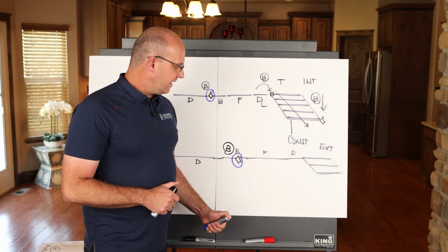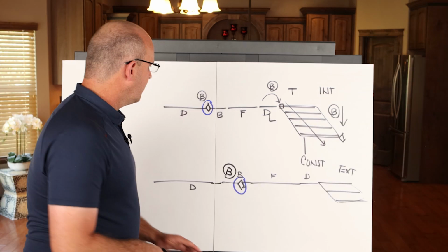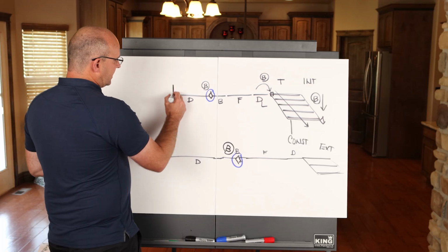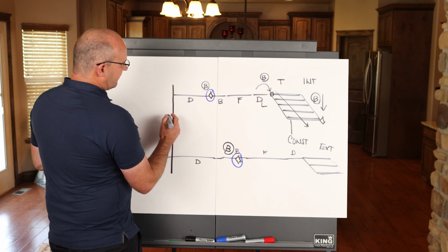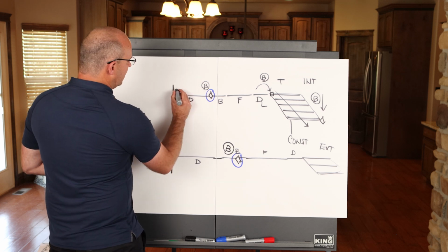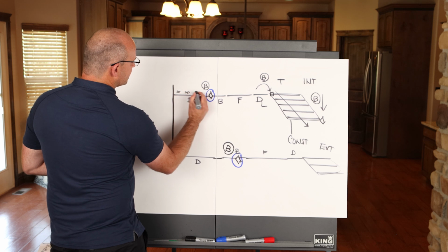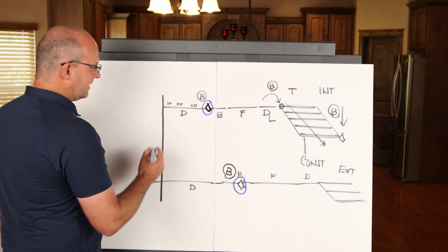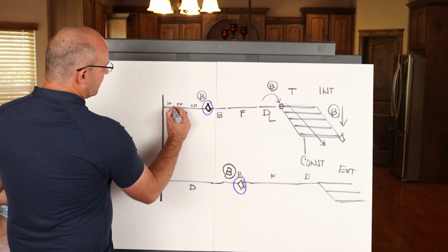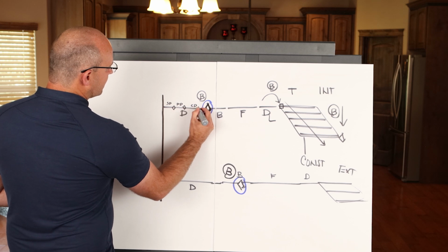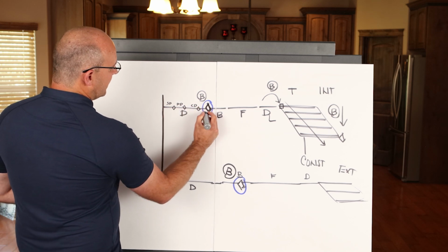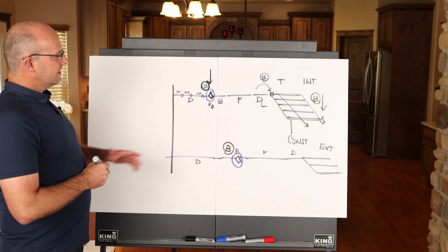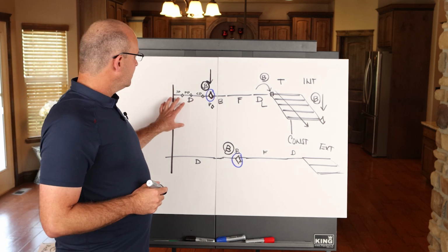Now, when you have that, then you'll be able to go through and do what I call a milestone pull or a phase pull. That's where you take, hey, here's our current date. What are the different phases? Let's say we're using the traditional definitions. This is schematic design. This is design development. This is when you're developing your construction documents, right? And you have to be done with this by that date. So understanding the intermediate milestones: when is schematic design going to be done, design development, construction documents, and then obviously when is the permitting milestone, which should be the end of your milestone plus your buffer. This is super crucial.